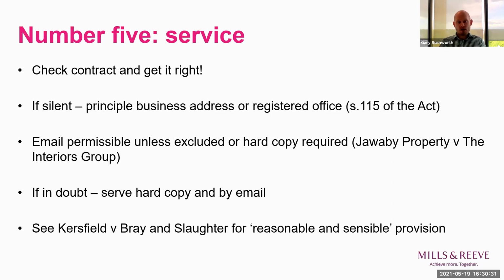If your contract is silent, then send notices to the other party's principal business address or its registered office. And I think, as Patrick touched on earlier, you can serve by email unless the contract says otherwise. If it says you can't, or if it expressly requires a hard copy, then obviously you need to send a hard copy notice. I would say if you're ever in any doubt, just send by hard copy and by email, and then you've covered your bases.